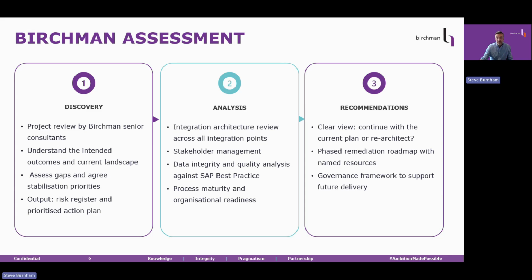So after the discovery phase, we move to analysis. So 4 work streams, each producing a specific actionable finding. The integration architecture review converts "the integrations are broken" into a rated assessment of every integration point with remediation options.